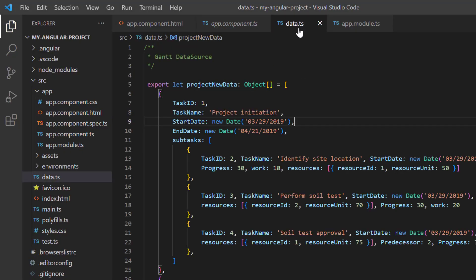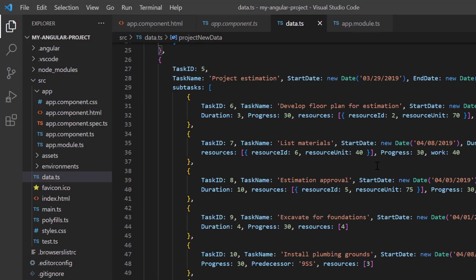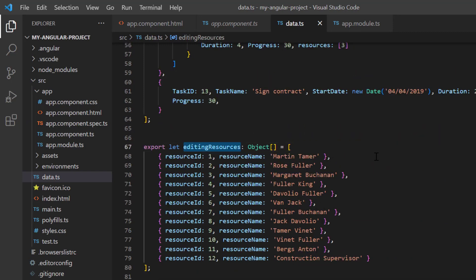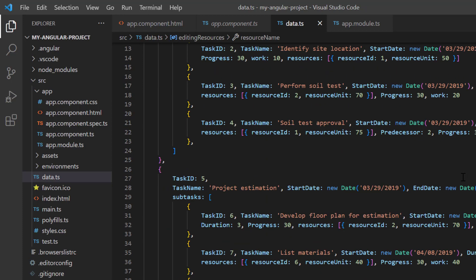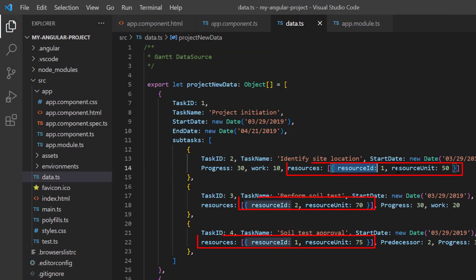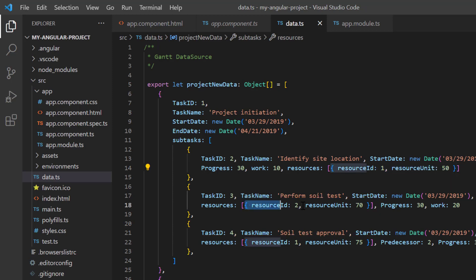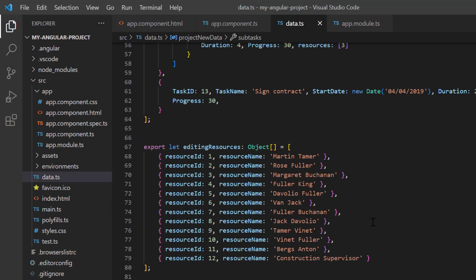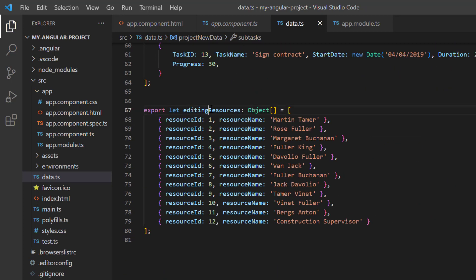In the data.ts file, I have added the object editing resources, which has fields like resource ID and resource name. Notice the object project new data contains a collection of resource IDs and resource units in each task. When the unit is not specified, the amount of work done will be considered 100% by default.